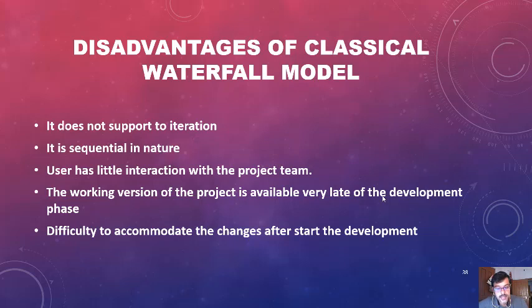And users have little interaction with the project team. Their feedback is not taken during development. When development is going on, the customer's feedback is not taken. The customer's feedback is taken only at the end of the project, when it is completed. If at that time the customer asks for some changes, then you cannot incorporate them into your project. So these are the drawbacks.